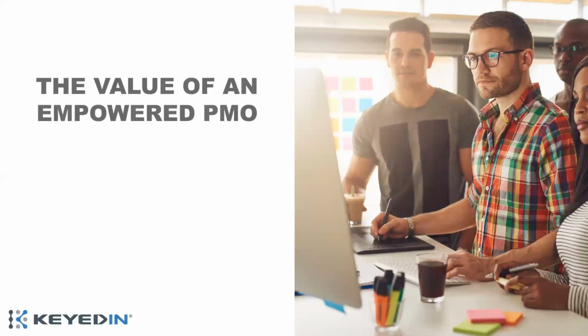And they basically gave me a call and said, hey, first year in, our budget versus actual is less than $100,000 on a $58 million portfolio. And those were noted in the tool. So we actually had tracking of that information. And from a PMO perspective, it's shown quite well to the organizational leadership that we had control over the budgets, which is really important for a PMO. So that was some of the impact of actually having a tool in place and actually being able to support what that organization needed to be able to report.